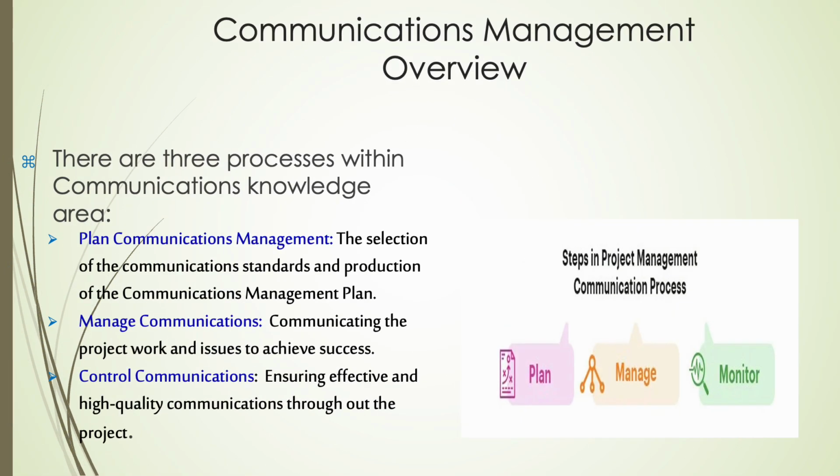Effective communication is critical to project success, and managing it involves 3 key steps: plan, manage, and monitor. During the planning phase, project managers determine who needs information, what details must be shared, when communication should occur, and the appropriate method for delivering it. This results in a communications management plan that serves as a roadmap for ensuring everyone receives the right messages throughout the project lifecycle. Clear planning helps prevent misunderstandings and aligns all stakeholders with the project's goals and timelines.